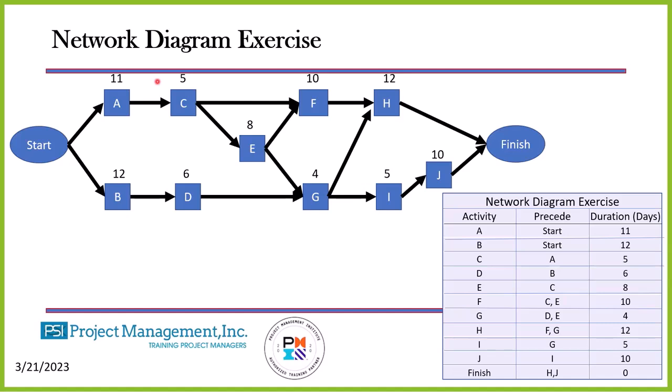I have breaks, I have lunch, I go home at night, I may have weekends in there, I may have resources that are not available for 2 or 3 weeks, physical resources, I may have some holidays, vacation, and I may only be working on this project 10% of the time. That actual 40 hours of effort can turn into 6-8 weeks of actual duration.